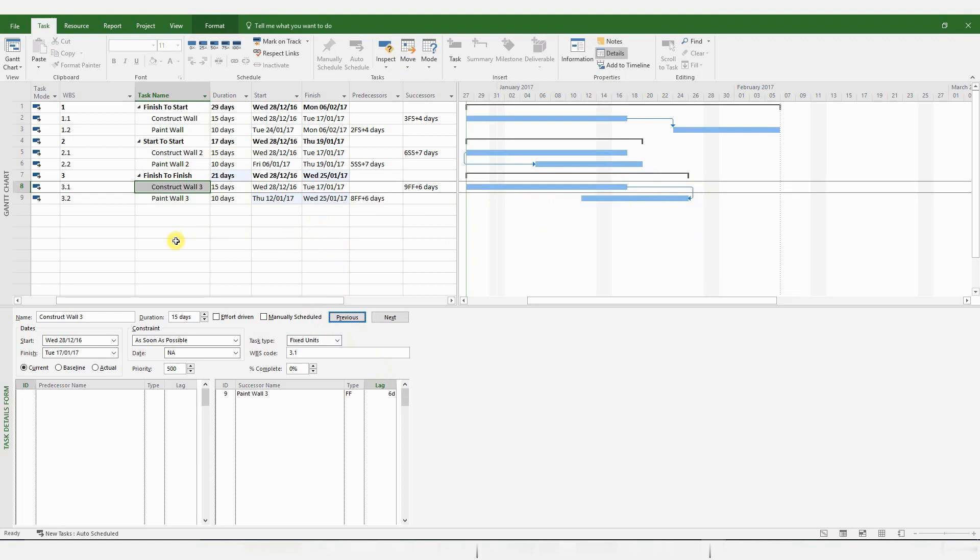I won't be looking at a Start to Finish logical relationship because it's rarely used. And I think if you do actually see it in any program, then there's something drastically wrong with that program.